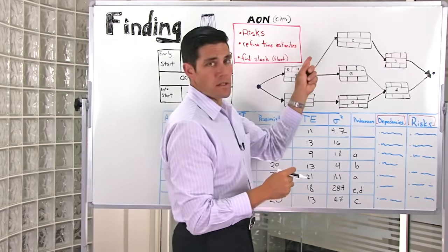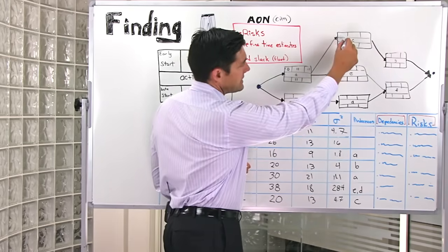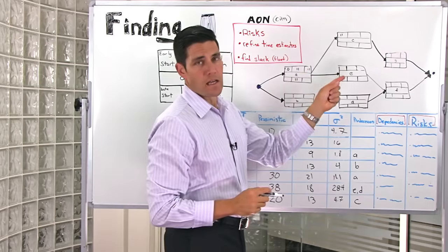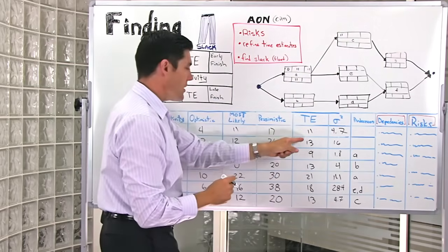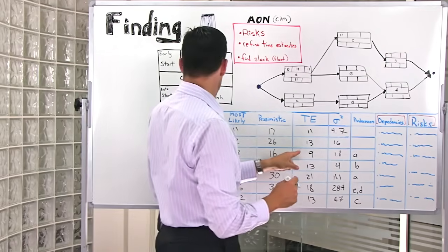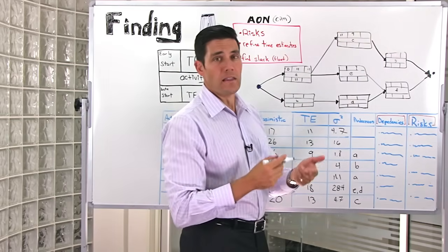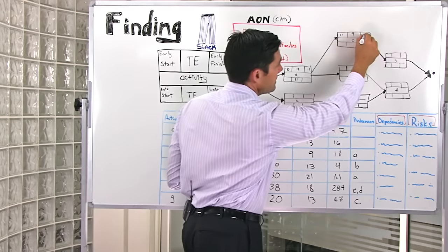Now we'll go to the successor task of that task, which is C. In task C, on the early start, we put 11, because that's the earliest time that project activity can actually start. We know from our chart, when we've worked out with our project team, the expected time for C is nine days. So we can again calculate the early finish for activity C, which is quite simply 20.